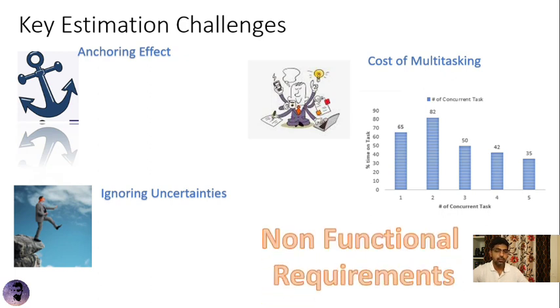And finally, one of the key things is non-functional requirements. We totally ignore these, such as logging, tracing, auditing, performance testing, CI/CD deployments. All these are non-functional requirements that add effort to your existing task. So all this has to be factored in when you are estimating. Okay. So these are some of the key challenges. There are many others, but these are some of the key things that we have to keep in mind when we are estimating.